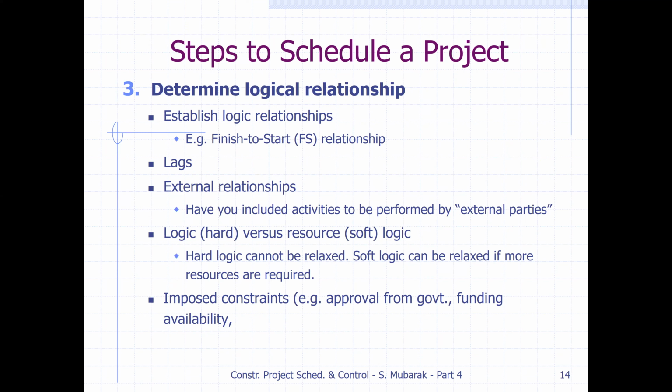We can also have external relationships. Have you included activities to be performed by external parties? Like work being executed by subcontractors. Then include their time for their work.